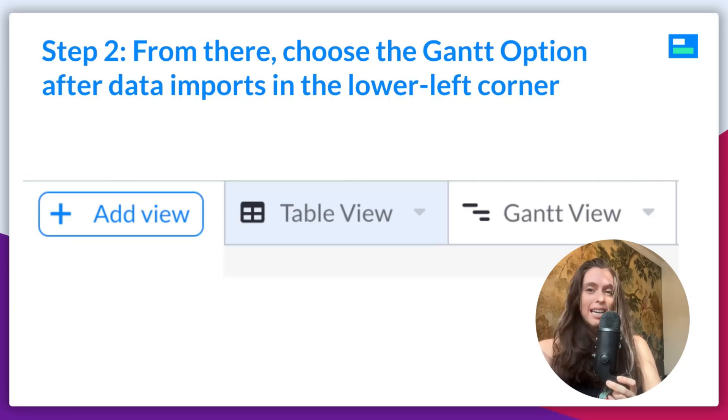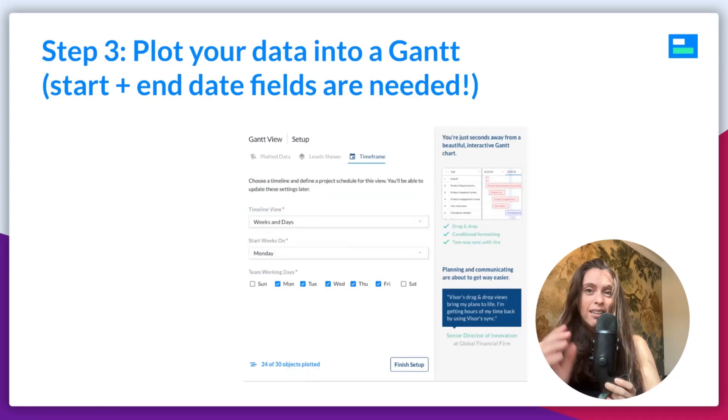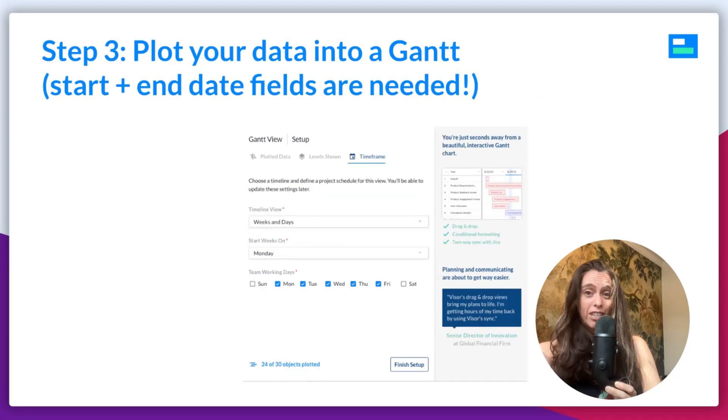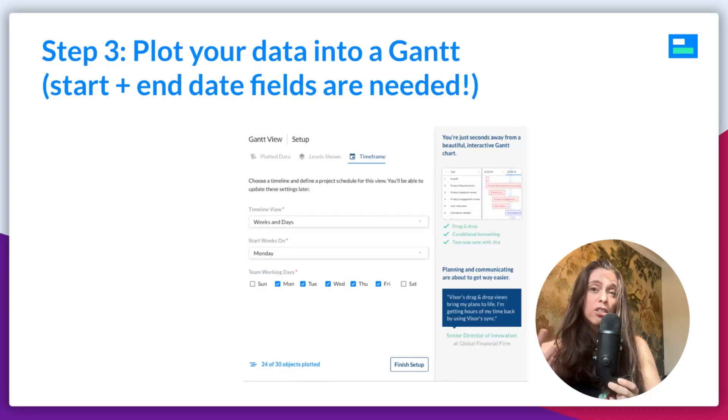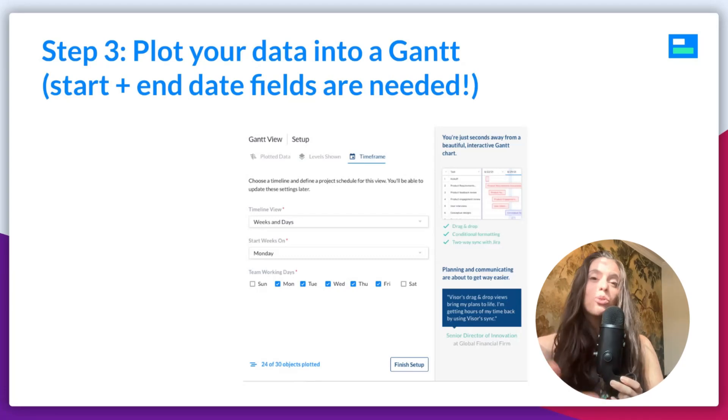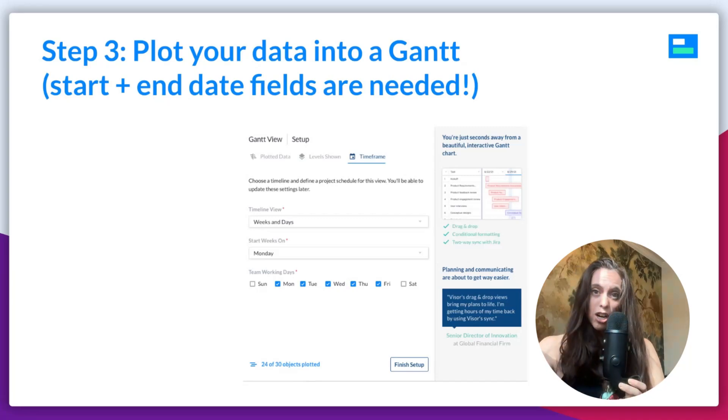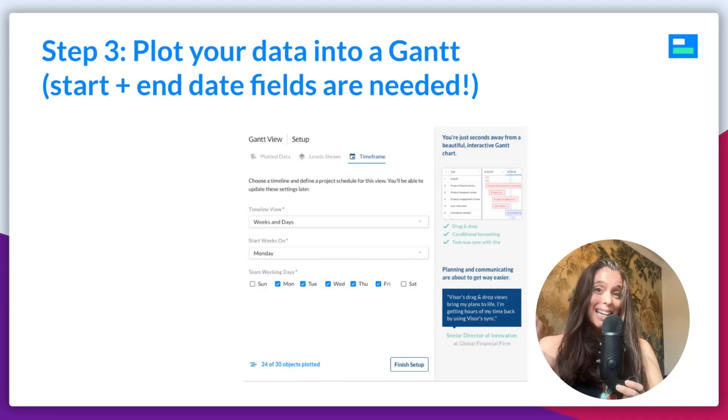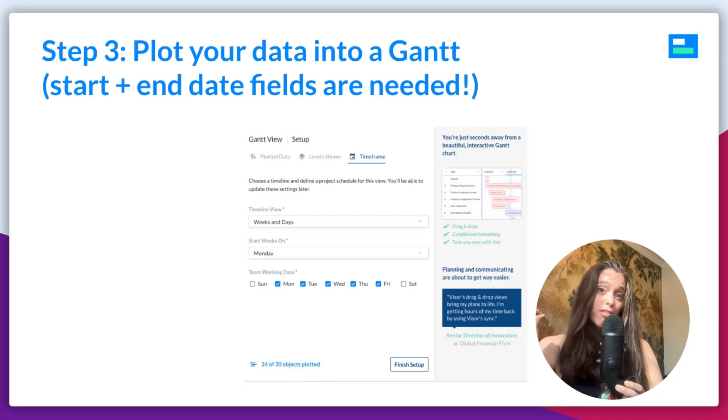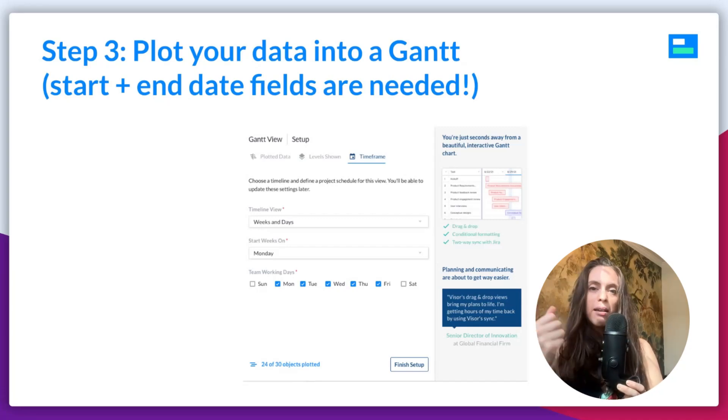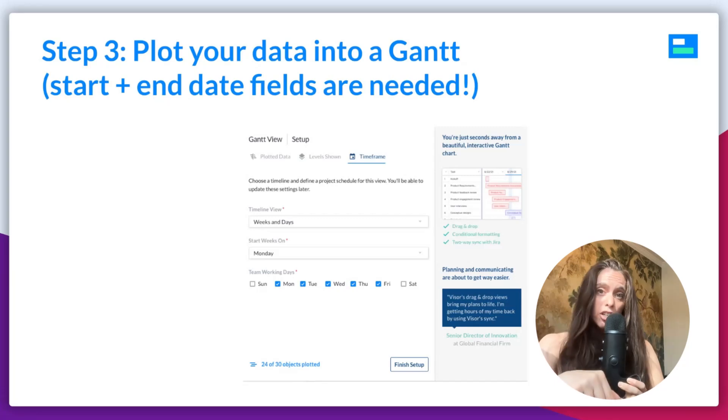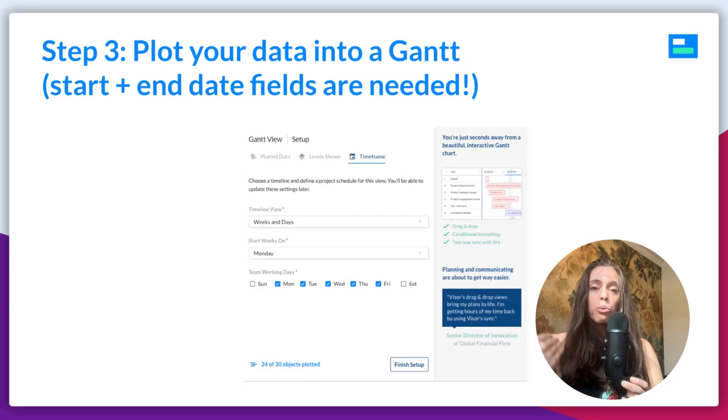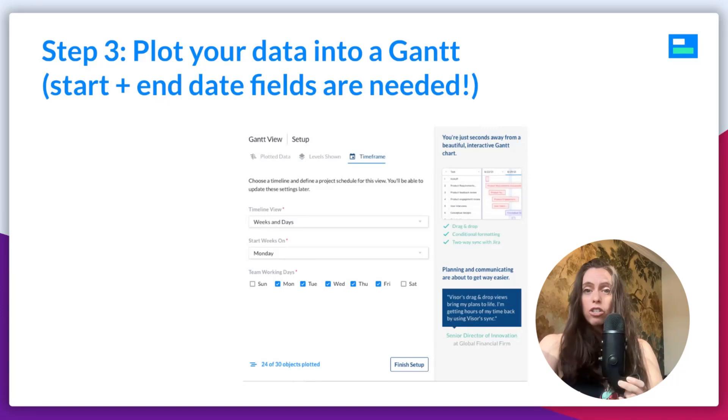Now, one really important thing to note here is you're going to need start and end date fields in order to plot your Gantt chart. Gantt charts are showing bars across time. So, you need dates in order for the Gantt chart to plot that data across time. If you don't have start and end date fields in JIRA, because that's just not the way your team works. Maybe you're very on an agile team and you just don't do that. You can make start and end date fields in Visor that do not get pushed over to JIRA in any way. It's a really helpful way to make your Gantts in Visor with your JIRA data without affecting how things are structured in JIRA.